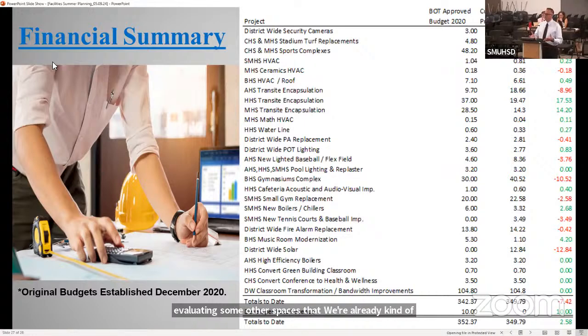So it was an exploration period. Good thing that Mill did not have that much transite, so we took some of that budget from Mill's project. In some cases it's going really well, and well in budget, if not saving quite a bit. I was just curious about what happened with Aragon. Absolutely. It's just exploring and finding more spaces that had transite, under stairwells, things that were just storage, and we said, that's transite, so we have to cover it.